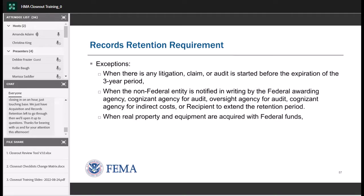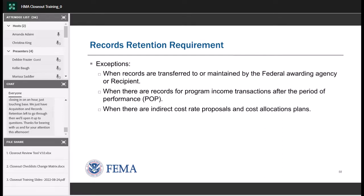There are exceptions to the three-year records retention period: if there's any litigation, claim, or audit started before the expiration of the three-year period; when a non-federal entity has been notified in writing by the federal awarding agency to extend the retention period — FEMA will send a letter to let you know; when real property and equipment are acquired with federal funds — for all acquisition projects a file must be maintained for those properties in perpetuity; when records are transferred to or maintained by the federal awarding agency; when there are records for program income transactions after the period of performance; and when there are indirect cost rate proposals and cost allocation plans.